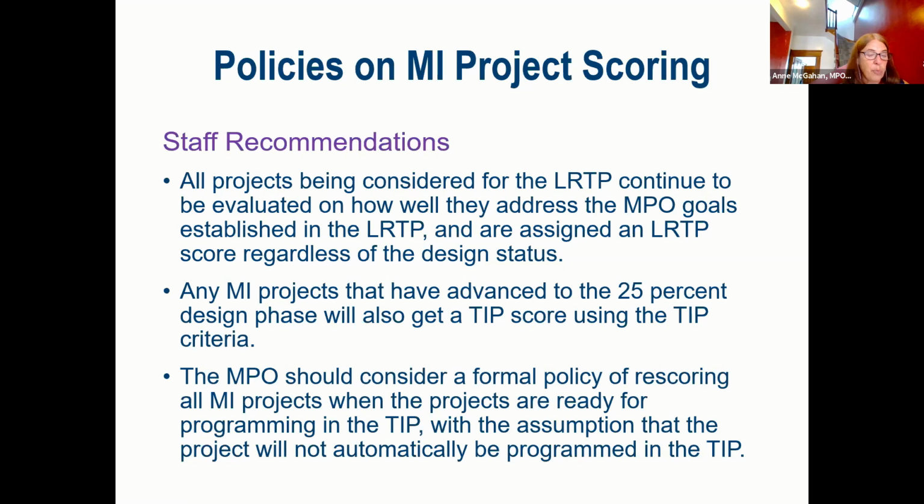When the project is ready for programming in the TIP, project proponents would have had the opportunity to address concerns received during the public input process for design. It can also be assumed that from this point forward, the design won't be altered too dramatically. And once the TIP scoring has been completed, the project can then be compared to other projects within the major infrastructure program and other investment programs.